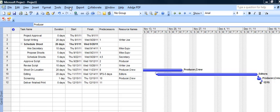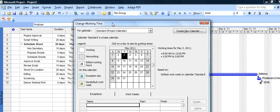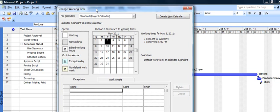So if we go up here to the menu to Tools, Change Working Time. When that menu opens up, it brings up a calendar for us and the grayed days are non-working days. Now we can change those to working days if we want, but in this case that looks reasonable.